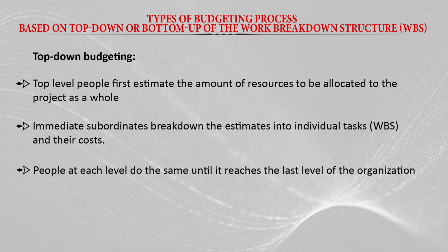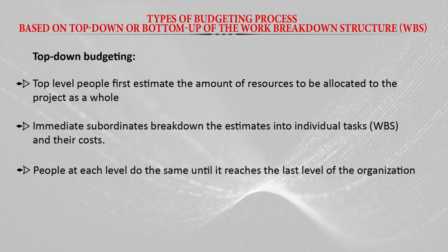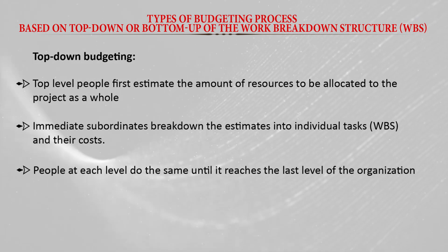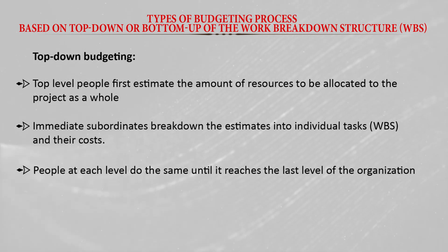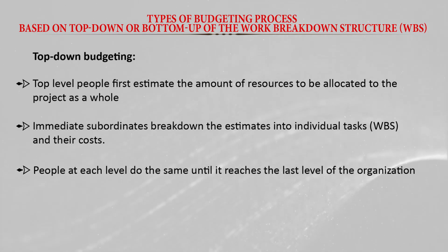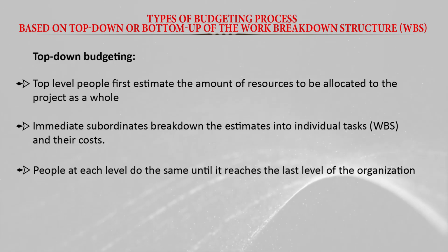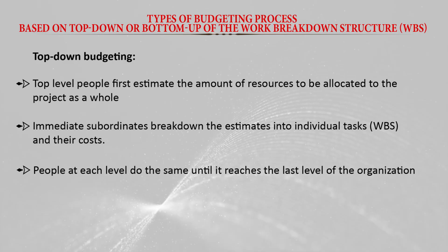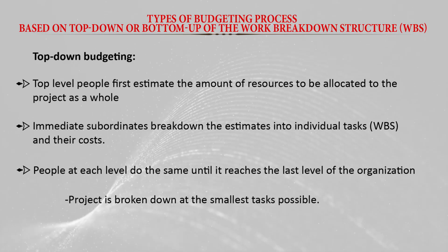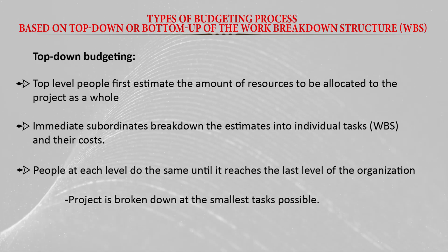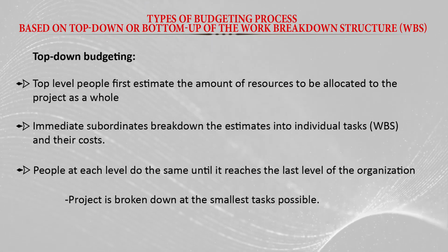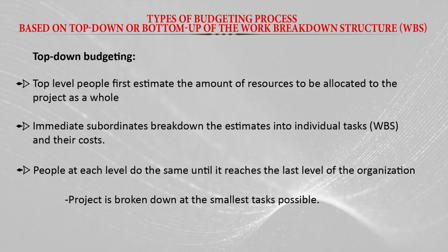If a project is implemented at different stages, from state to district to the grassroots village level, then at all levels they have to calculate the budget and estimate the activities they will undertake to implement the project. So in this process, we break down the project into the smallest tasks possible, and at the last level of activity we estimate the budget of each activity.